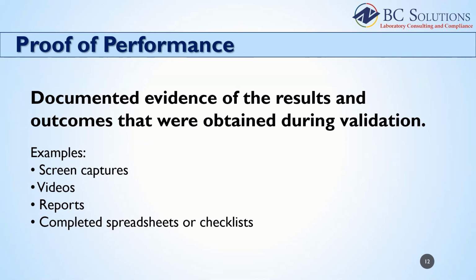Electronic screen captures and videos are good tools to document results. There may be other documentation, such as reports or other printed materials, that would be adequate proof of performance based on the test case you are validating. Checklists may be adequate proof of performance if you only require observable evidence, such as instrument readouts or displays.